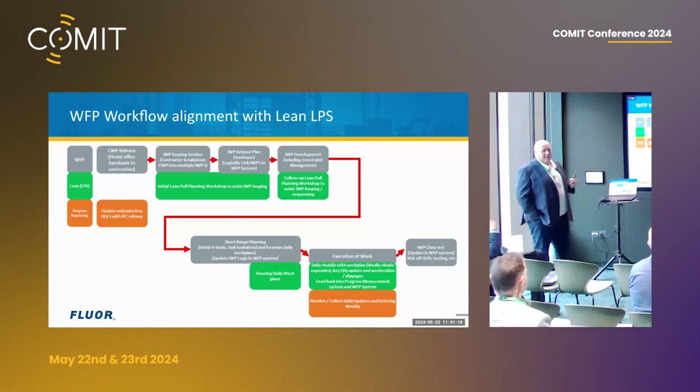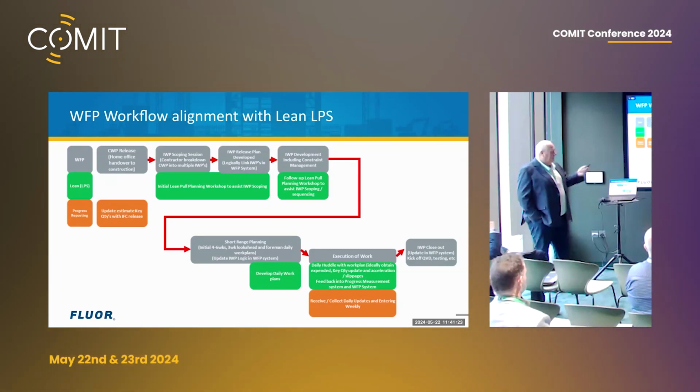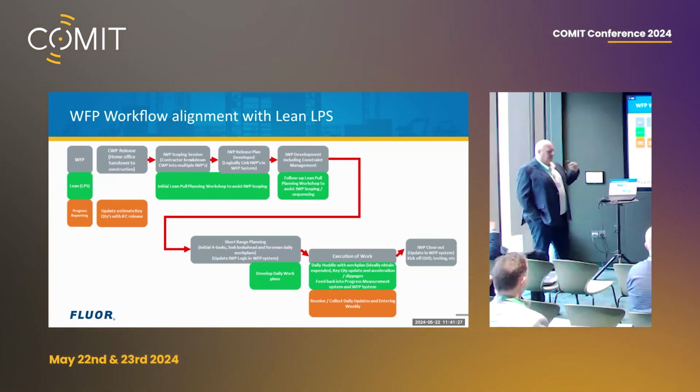They don't care about 6 weeks. It's too far ahead. They want to know what they're doing the next 2 weeks. Then we go into the daily work plans. When they start executing, with their foreman, we have a daily huddle, 10 minutes.